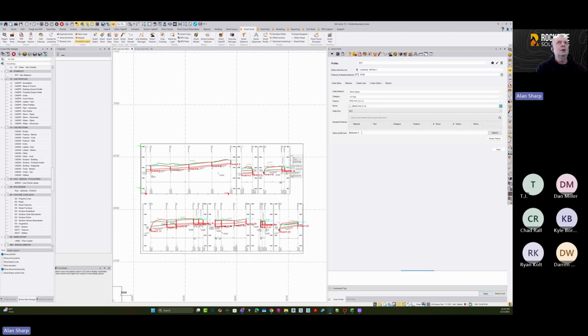Smart Feature defines how the object is created and what subsidiary data you want from it. And then you apply it through an application that's dedicated to the task, right? So if you're building point data for staking, or line data for staking, or you're building models for curb and gutter machines or models for paving machines, what are the rules, right? And that's the big trick here: the rules for rebar and tie bars and that stuff were just stuff we had to understand. Once you've understood them, you can build them into the feature so that then you can build the tie bars and rebar directly from the concrete pavement object, and make it dynamically linked. So that's the next big jump of everything we're doing here: how do we make really constructible objects from the data that we're creating.